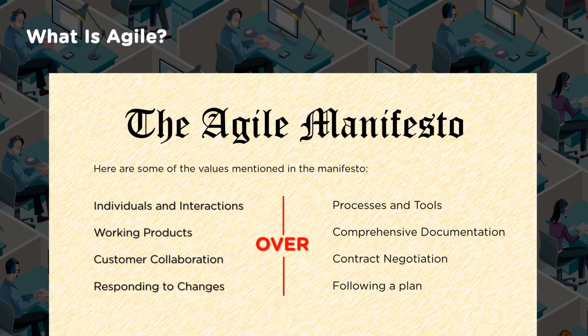As I create the working pieces, I'm also getting the feedback because I'm interacting with the users, the consumers, the end users. So I get the feedback, I keep making the changes quickly, and the documentation becomes accordingly. The small pieces of documentation which happen with those small working modules are consolidated over a period of time. By the time the project ends, you have a comprehensive documentation. So it saves a lot of time. So documentation is important, but the way we accomplish the documentation is one by one, not in one go.